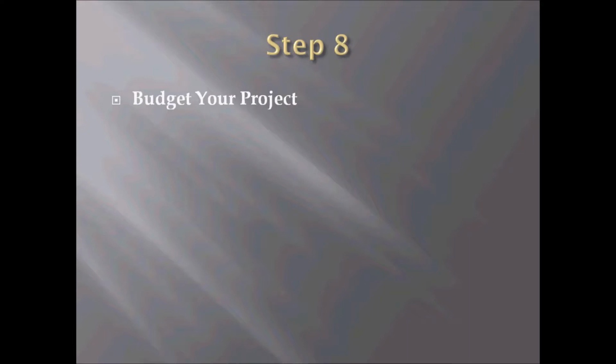The next thing, once you have defined who's doing what and what roles and whatnot, is when you actually start budgeting that project. You know how much these people make, essentially. So you need to start figuring out how much it's going to cost if I pull Joe from accounting to do the finance side of this project. How much is it going to cost, an hourly wage for him to work on this project?